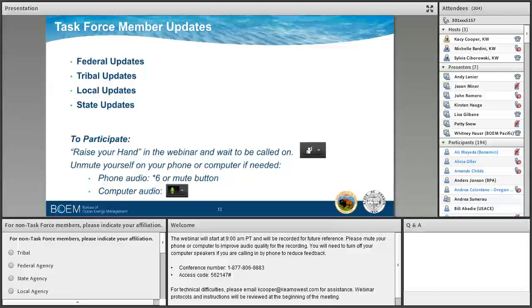Thank you, Keith, and good morning, everyone. As Keith mentioned, I'm Candace Nachman with NOAA Fisheries Office of Policy in headquarters. For us, there are a few issues that we've learned from working very closely with BOEM on the East Coast of areas that are critical for early engagement. One area of importance is area identification. While it might be more time-consuming on the front end, we do think it is critical to understand potential impacts and overlays with our trust resources before wind energy areas are finalized and offered for lease. Having this earlier engagement can hopefully lead to fewer use conflicts later on in the process.